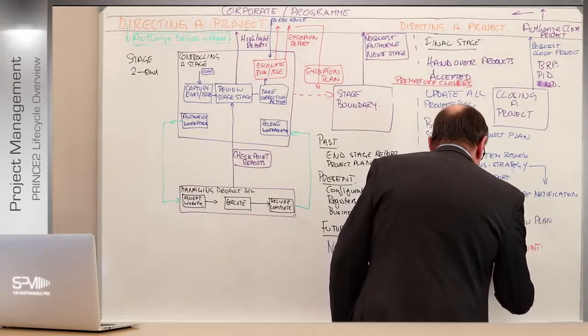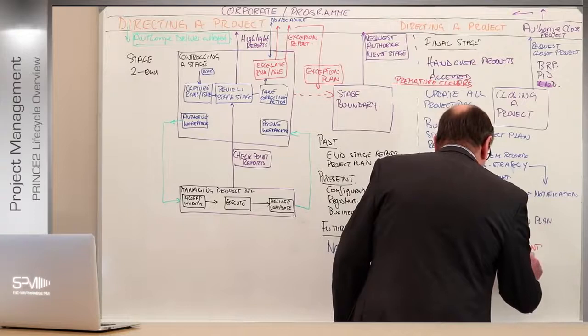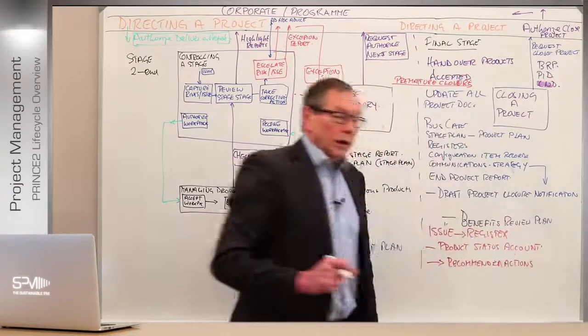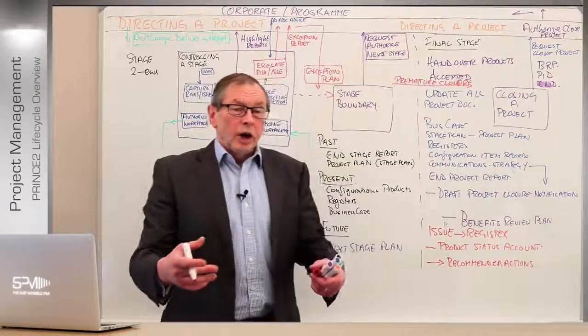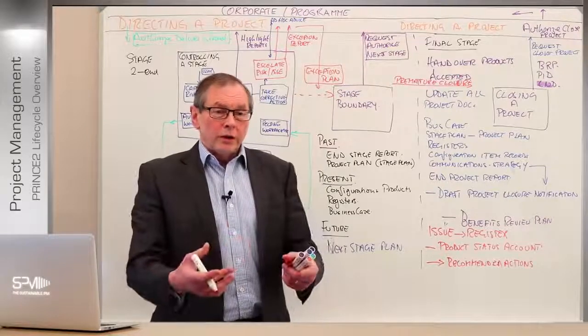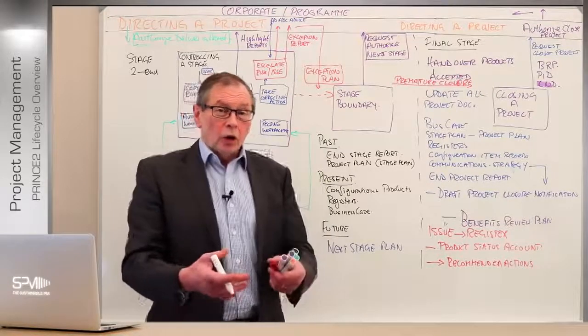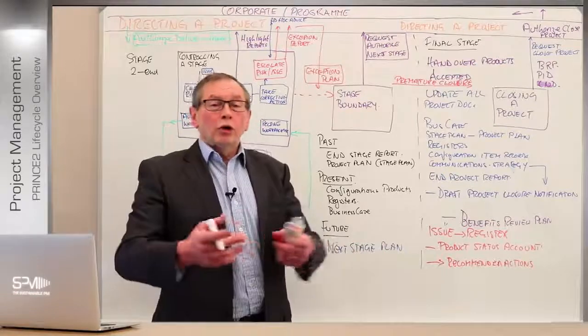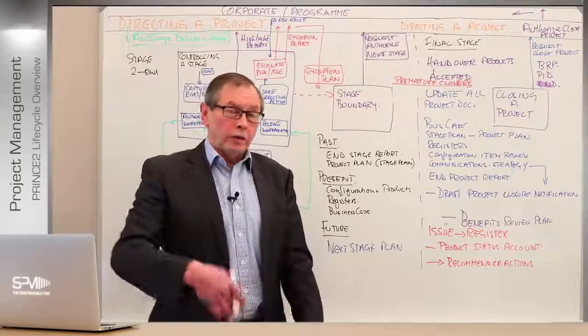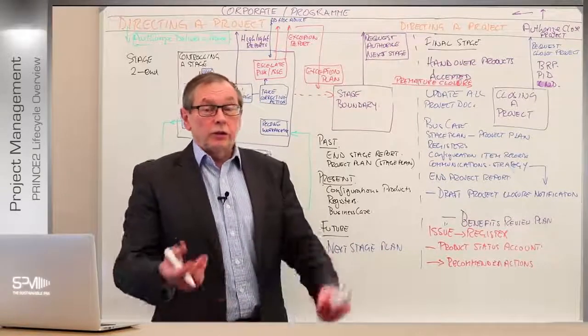Recommended actions from here. For example, if you've got something in the middle of being done, you've got to decide what I'm going to do with what I've got being done. Do I complete them or not? Stuff that's done already, what do I do with that? Do I store it for the possibility of use for a later date, or can I just scrap it, for example?